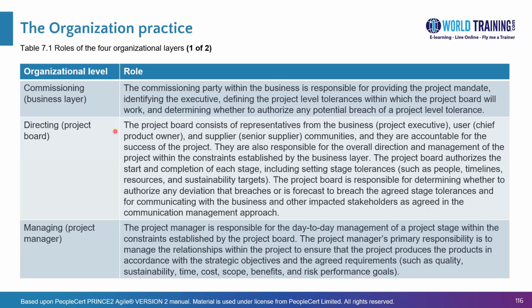I'm saying possibly because it's not necessary that there is a supplier representative from every supplier organization. It depends on the composition of the board that is being created. Imagine for a moment if there are 15 suppliers and there are 15 senior suppliers in the project board. They will take a lot of time to make decisions. So the project executive has a say in who will be in the project board.